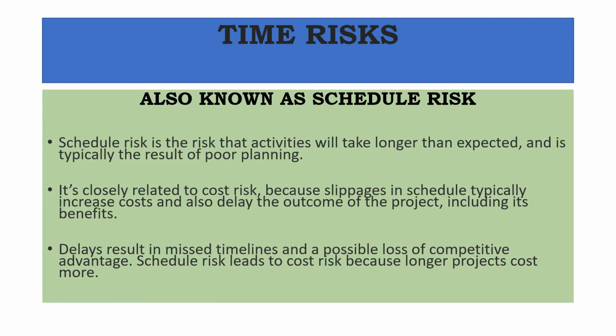It is very much related to the cost risk because slippage in the time or the schedule increases the costs and also delays the outcome of the project, and also has a negative impact on the benefits of the project. Well, delays result in missed timelines and possible loss of competitive advantage, and this schedule risk leads to cost risk because longer projects cost more. So it's very important to address this risk.